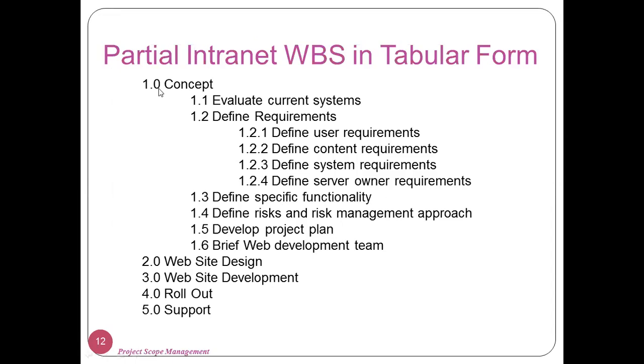In this, you have to learn that the first level, and the next level would be the indented level of the first one. And if this next level, the second level, has further parts or any further sub-distribution or any other level or hierarchy, then that level would again be indented to the right, and you have to mention all those levels.